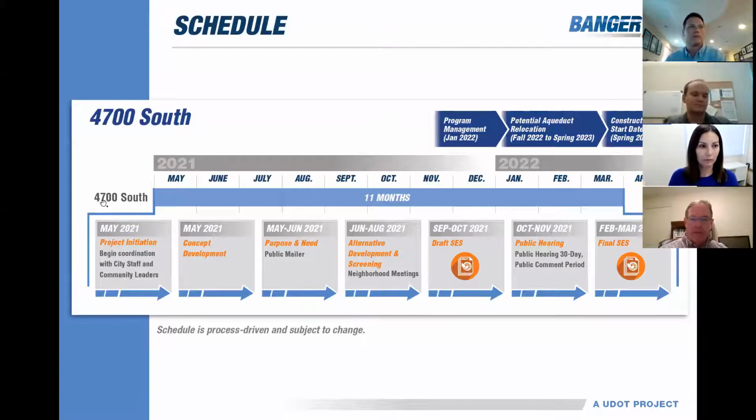However, with houses, we do something similar depending on the needs of the owner, but the minimum, when I said 90 days, it's a minimum time frame for our federal and state regulations. And that's from after the owner has actually received an offer. So the time doesn't begin until that time. But yes, usually with businesses, we understand it takes longer.